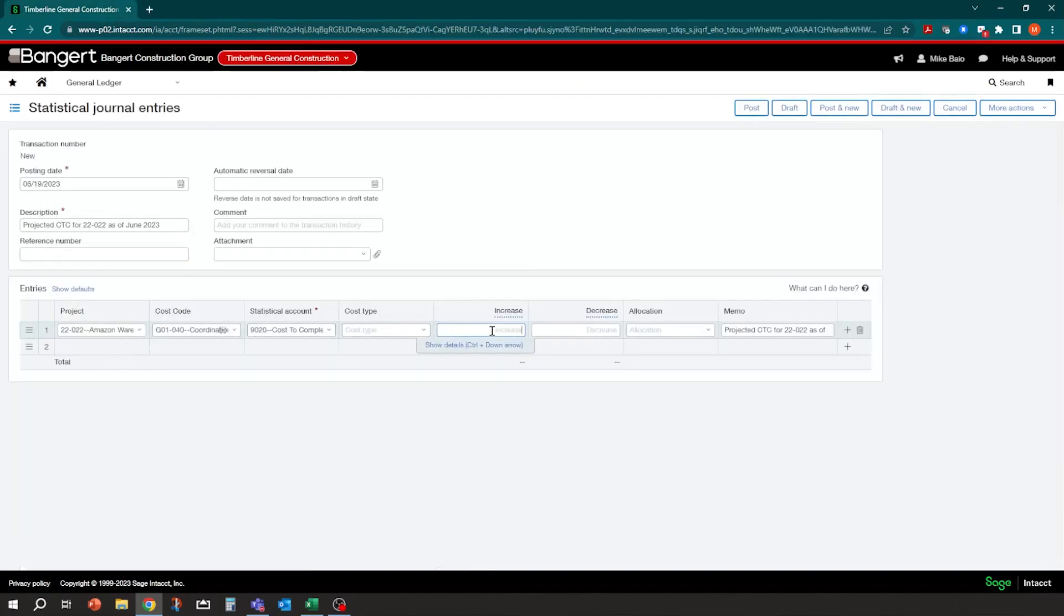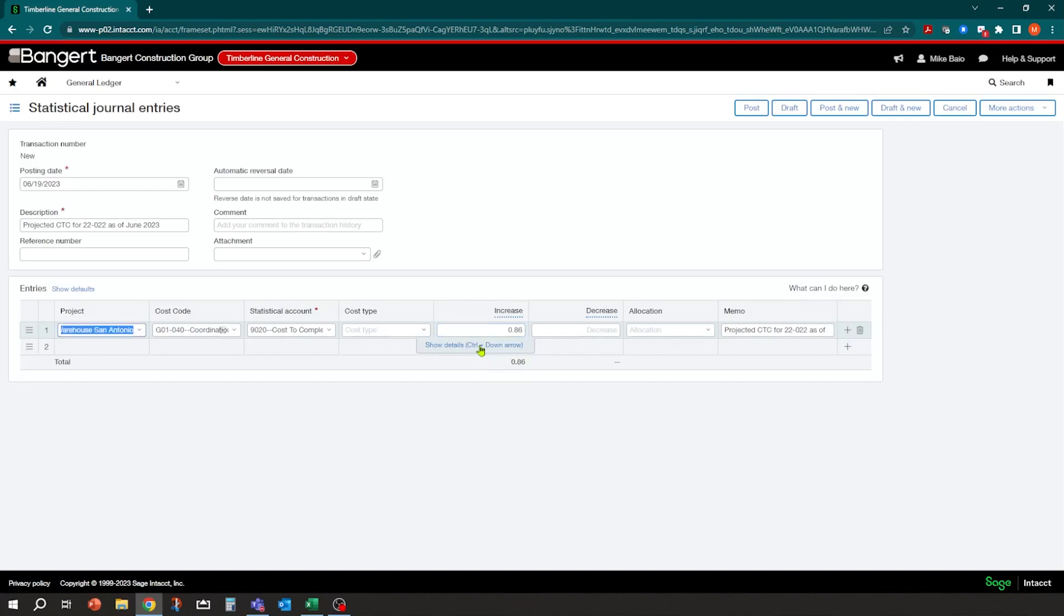So back to my entry, and now I can just come into here and say, we're going to project 30 more thousand in costs for this month. Or we could also convert this into a percent. So you could say, I project we're 86% complete or 0.86. And we could use that in a calculation instead off of budget estimated cost or actual costs, however you want that calculation to happen. It's all based in the formatting of the report. So in this scenario, we can just say, we're going to have a projected $35,000 more in cost.